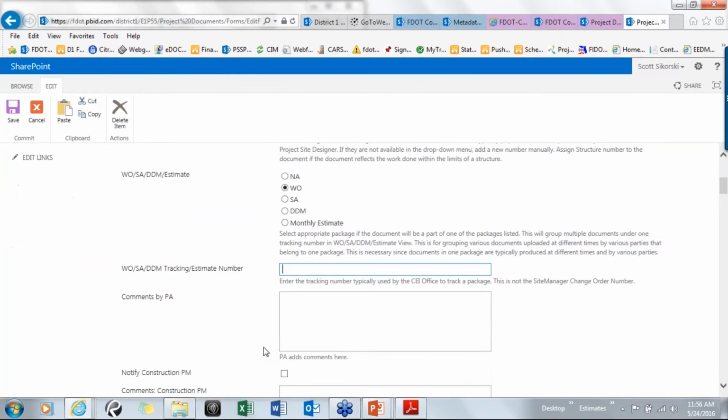we'll keep going down. We also have areas for different users to comment on the document. And the projects all have SharePoint sites. Retain this information, and later on, once we close the projects, we will be archiving all that information, which will be tied to the EDMS number. Our projects all have SharePoint sites, but that is not the project file. I've got to remind you, just because a document is here doesn't make it a part of the project file. You have to define that document and decide whether it is approved or not approved. And once it goes into EDMS, that is the project file.